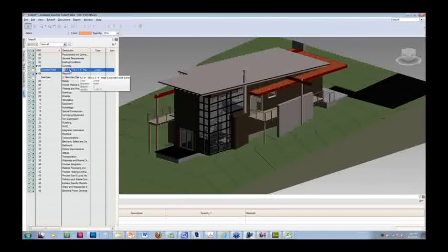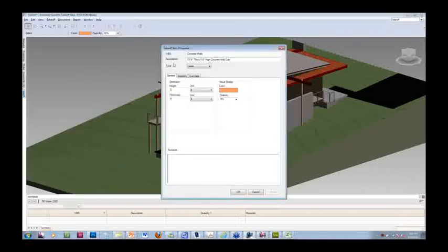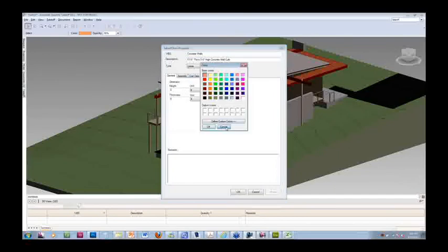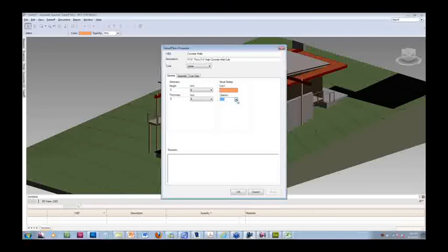I'm just telling you some information. And if I go further, I can tell it that this is going to be represented in a color when I have that in a plan with a particular opacity. If it's 2D, so it means that if I don't take the information that comes from the model, the height and the thickness, I can type it in here, so it knows automatically that that's going to be whatever, 6 inches or 12 inches.